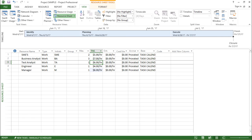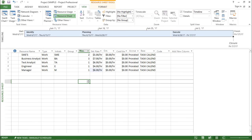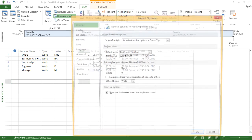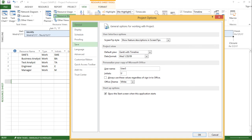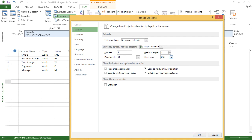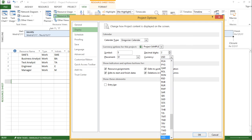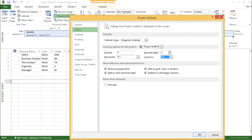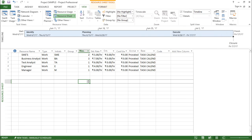I can also change the currency. If I want to change from dollar to rupees, I go to the file tab, move to Options, then to the display tab — there you can see the currency setting. I can change it by typing INR, and I can get the resources displayed in rupees as well. Let me apply the changes by hitting OK.